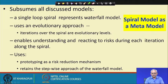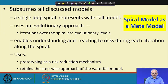The Spiral Model is called a meta-model because it has features of the waterfall model, incremental model, evolutionary model, and so on. If we have a single loop of the spiral, it is actually a waterfall model, and it also has features of the prototyping model as well as the incremental and evolutionary models.